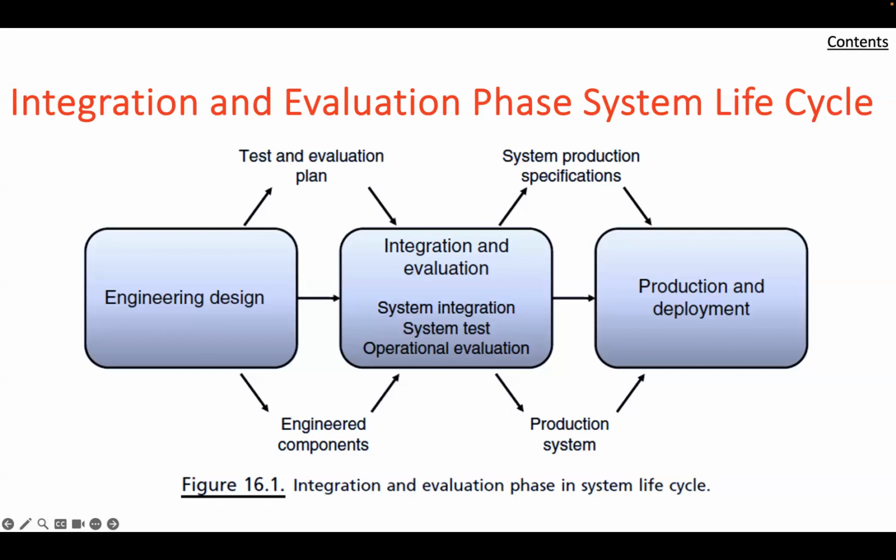In terms of agile systems engineering and integration, systems being developed with an agile approach will experience a number of integration efforts in the sprint cycle as they are developed, integrated, and tested. This approach will provide potential users many times to evaluate the additional progress and capabilities since the last sprint in order to test and provide feedback.